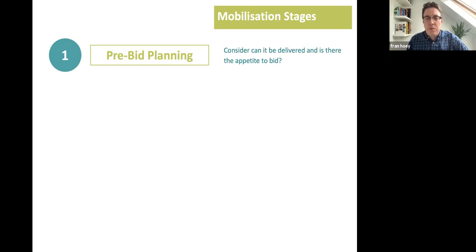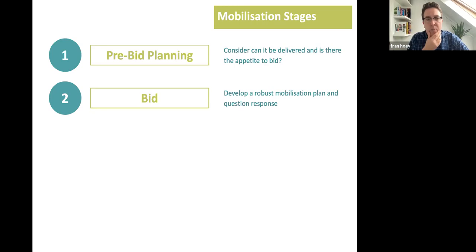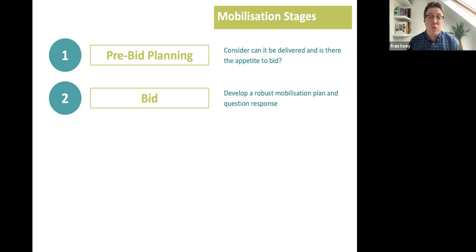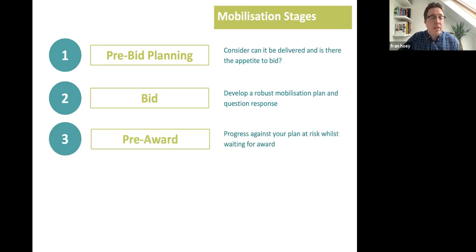Once you've done pre-bid planning and decided to invest, you get a budget together and during the bid you'll have to develop a mobilization or implementation plan. In recent years there's been more focus on giving confidence that it is a real plan — that you have the resources to deliver it. Previously there may have been a longer lead-in time, but now, particularly with short turnarounds, there's a lot of focus on giving guarantees that you can deliver from day one. You submit your bid and through various bid stages — initial bids, best and final offers, dialogue — you need to justify what you're planning to do.